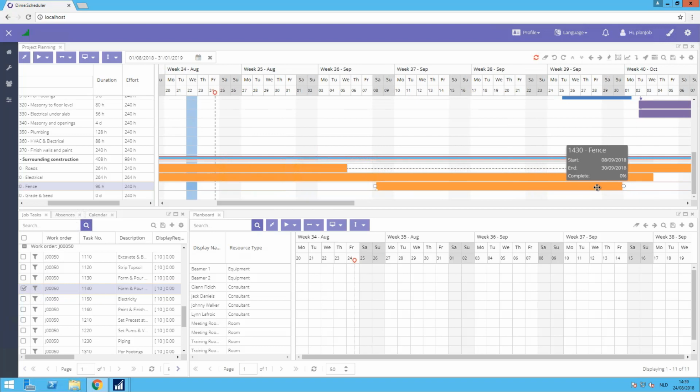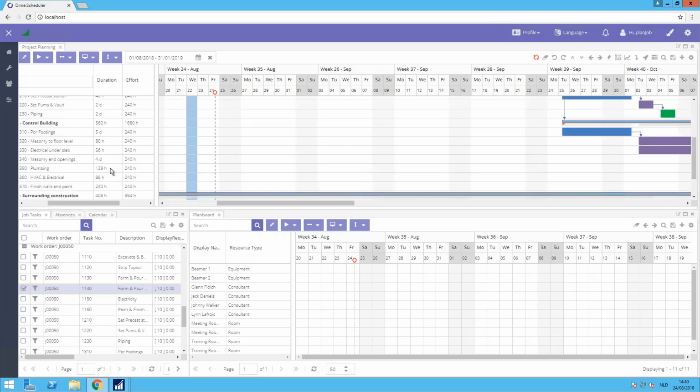So the length of the task will be recalculated automatically based on the calendar that is linked to it. So you will see also if I try to change the length of my task, you see it's automatically jumping to the previous weekend, and it's jumping over that weekend. It automatically also updates here the duration. If you say here I want to update duration like this, 80 hours, for example, you can also do that. You can work with multiple units of measure. I can change this also to 5 days, for example, etc., etc. So a lot of functionality also there.